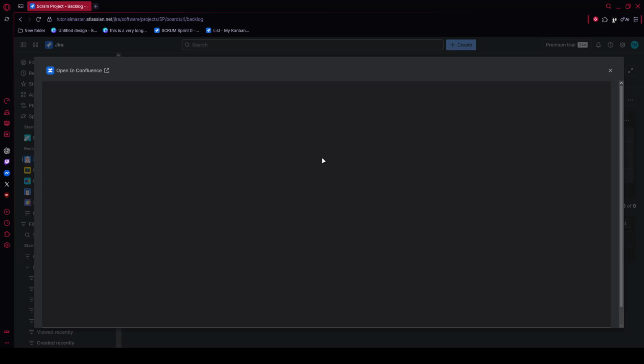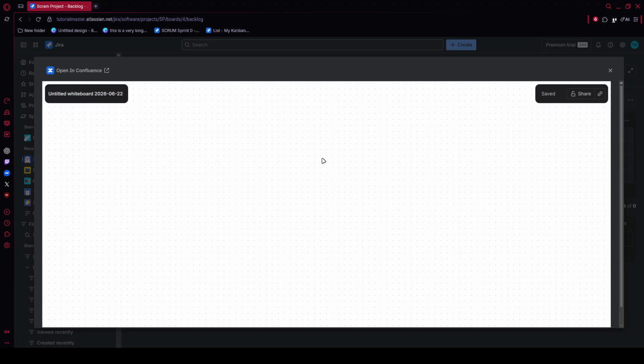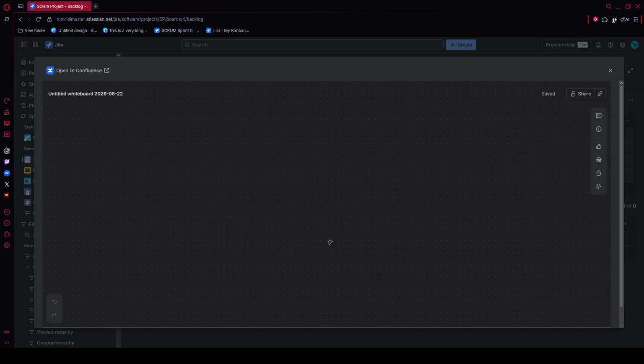Then review the completed issues section, where you can see which items reached done, along with their issue keys and planned work details. Keep scrolling to the issues removed from sprint section as well, since that can reveal mid-sprint scope changes that may have affected delivery.